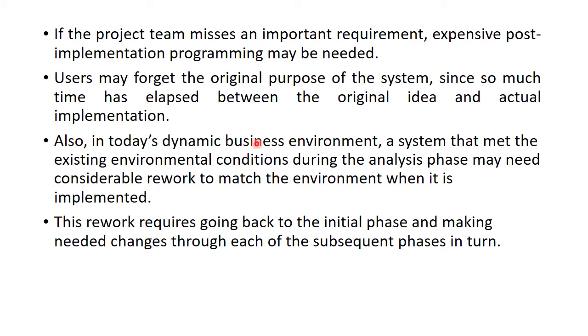So what will happen if we go for rework? This rework requires going back to the initial phase. It means that we have to start from the initial phase again and make those changes through each of the subsequent phases in turn, which will again take much time.